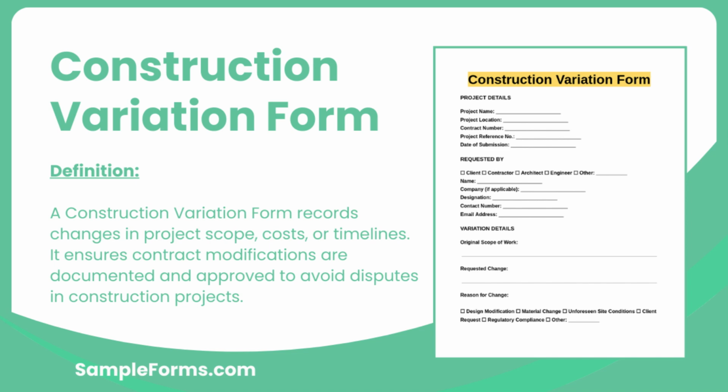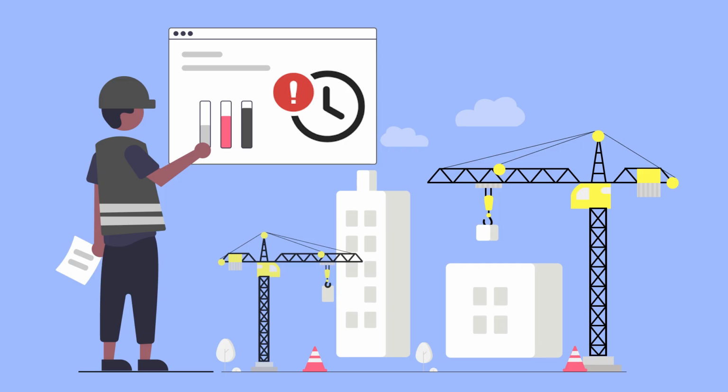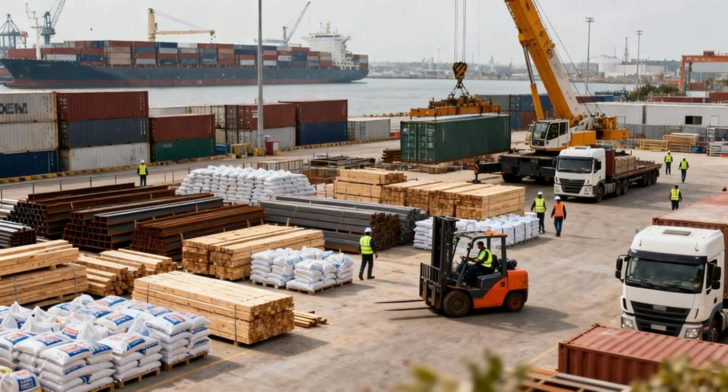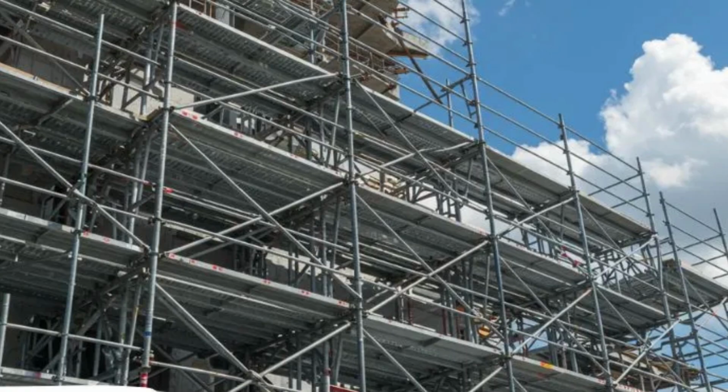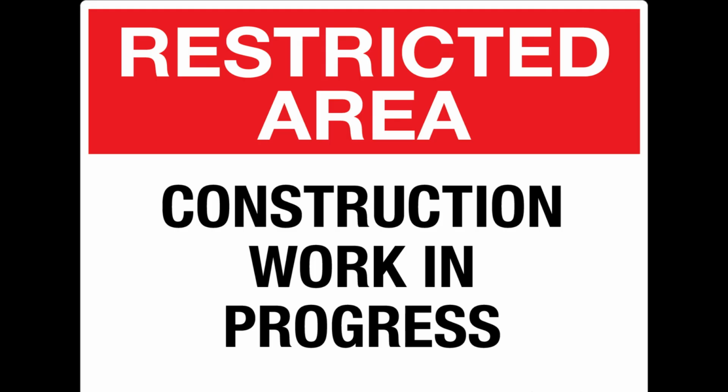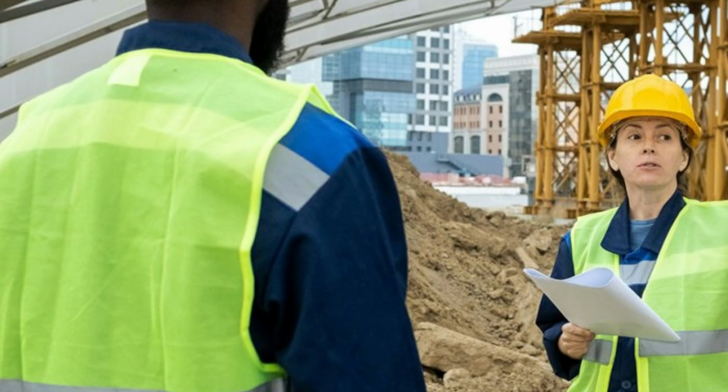variation rules or restrictive approval processes, client-controlled items that could delay work, late decisions or delayed access, long lead items with supply volatility, complex staging, limited site access or high public interface risks, environmental and permit conditions that restrict work hours or methods.